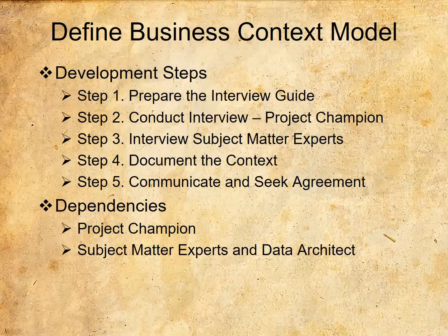This part of the project is highly dependent on the project champion's time, ideas, and willingness to participate. If the project champion is not engaged or available, then the project should be delayed or cancelled. Clarification and agreement of the context diagram by systems knowledgeable subject matter experts and other business area subject matter experts are important to get the scoping right. Having the scoping questions answered up front will pay off throughout the project.